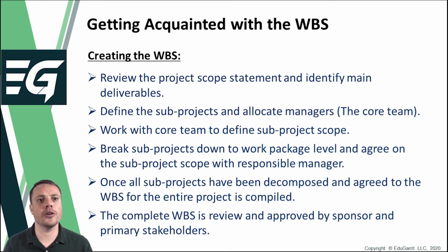From here, the project manager starts identifying the core project team members or the team managers to whom the sub-project will appropriately be delegated. And I say appropriately delegated because work is delegated based on the relevant experience and area of expertise of the core project team member under consideration. Note that these team members can be internal or external to the implementing organization. The main difference between the internal and external team members lies in the fact that their involvement will be concluded in the form of an agreement for the former and a contract for the latter.